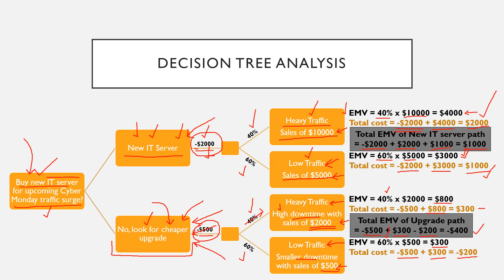Now calculate the total EMV for each path. For the new IT server: minus $2,000 (server cost) plus $2,000 (best case) plus $1,000 (worst case) equals a total EMV of $1,000. For the cheap upgrade path: minus $500 (upgrade cost) plus $300 (best case) minus $200 (worst case) equals minus $400. Since $1,000 is better than minus $400, you should buy the new IT server. That is how decision tree analysis helps you make decisions.